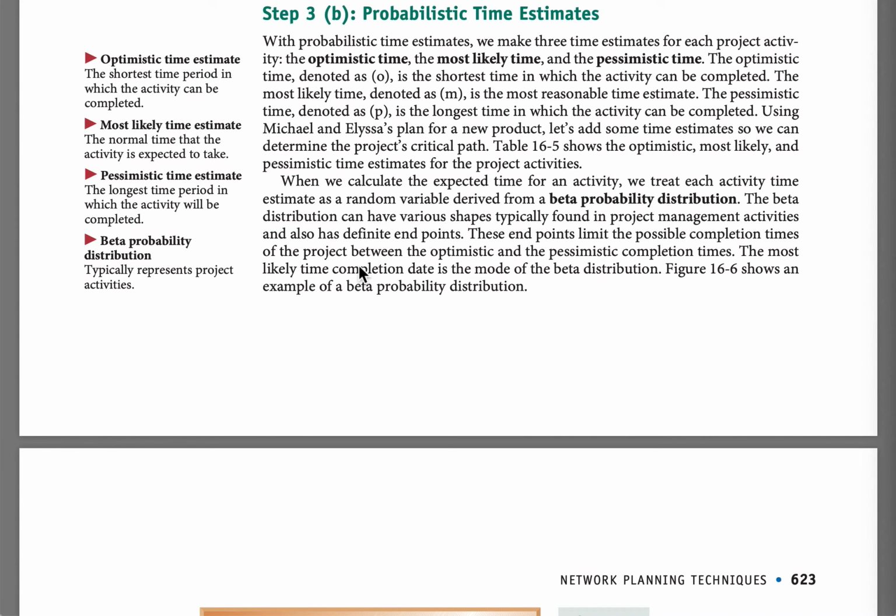Now, you will recall that in our last Skype lesson, we discussed the critical path method, which makes use of deterministic time estimates. But we also said that given that projects are unique and one-time, then we can't be certain about the duration of activities. This means that for your own projects, PERT, which I'll be explaining in this video, is more appropriate.